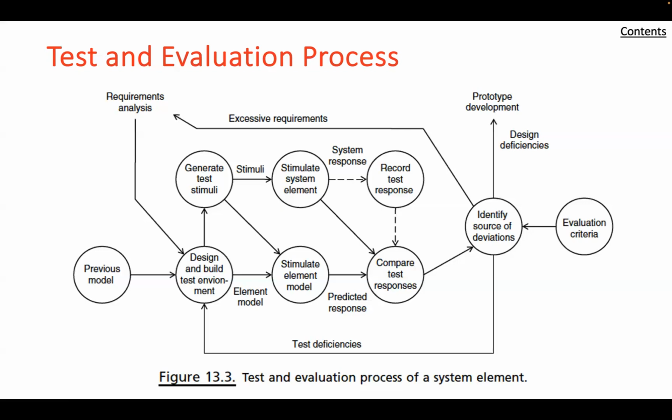There's the operational test and evaluation, which will include a discussion of purpose, configurations, test objectives, events, and schedules. There's also the test and evaluation resource summary. It includes a discussion about test articles, test sites, test instruments, test environments and sites, test support operations, computer simulations and models, and special requirements.